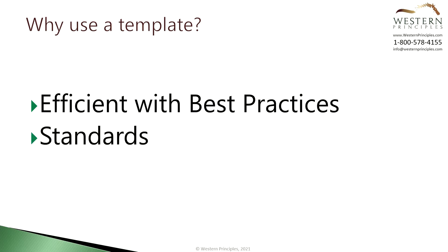Secondly using a template helps to enforce standards. The standards might be things like standard milestones that should show up in each plan.